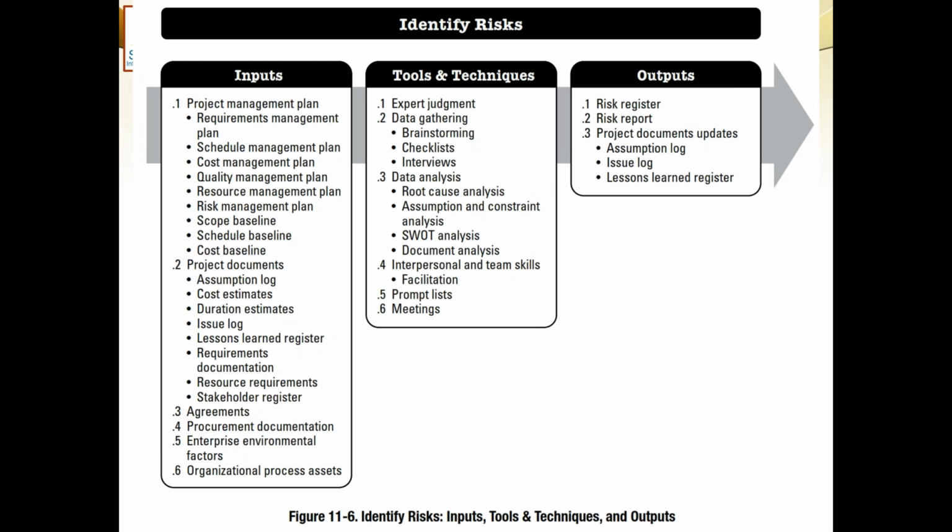But the major role played for the identification of risk is naturally the requirement management plan, because the requirement management plan is dealing directly with the stakeholders and collecting requirements from them. And therefore, there would be a lot of risks regarding requirements, regarding scope. So the requirement management plan is important for me for identification of the risk.